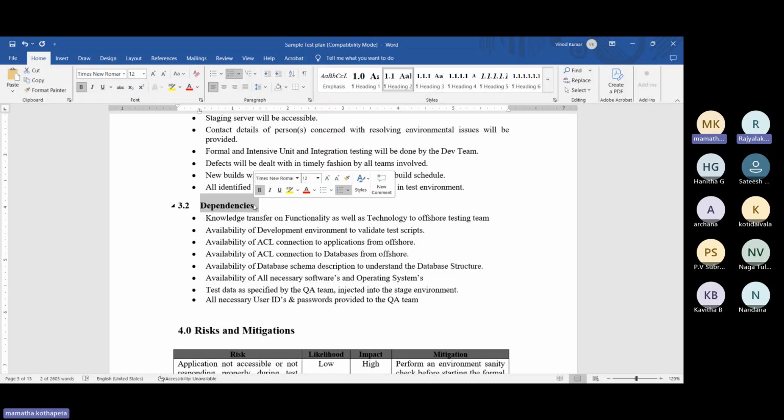No, it isn't. It means to test the e-commerce platform, to perform integration testing. Remember, we discussed integration testing. To complete the integration testing, what is the hard dependency? All the functionalities should be developed and working fine. Correct? If anything is not working, for example the payment gateway, then this integration testing cannot be performed. That's called a hard dependency.